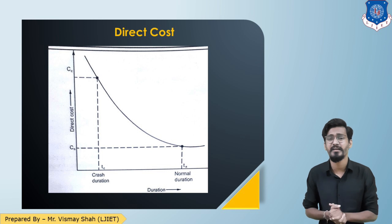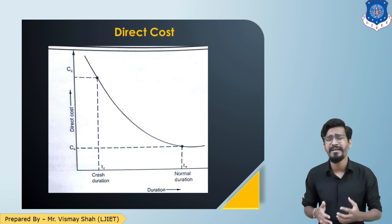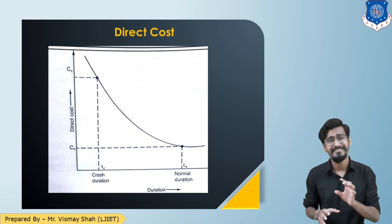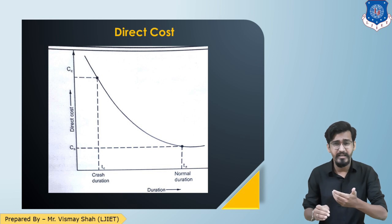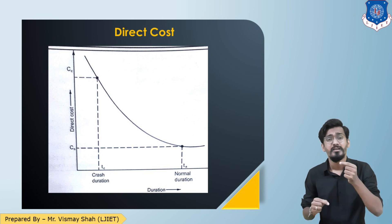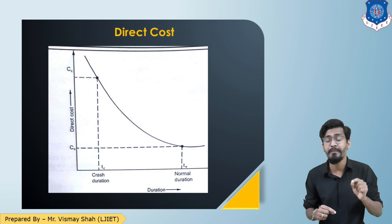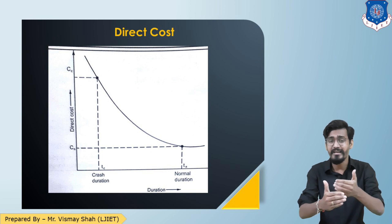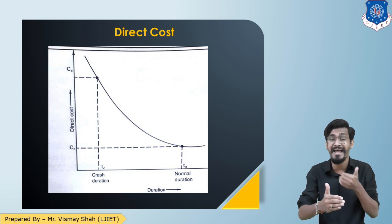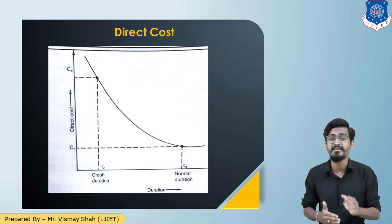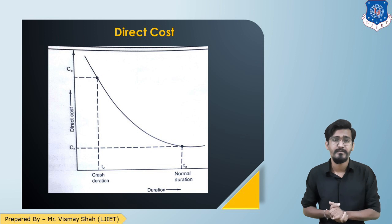At an optimum duration there is an optimum cost. But when we try to reduce the duration, the direct cost increases proportionately. The optimum crash point is the crash duration — an activity can be reduced up to a certain point. That is your crash duration, and at that point the cost is known as crash cost.